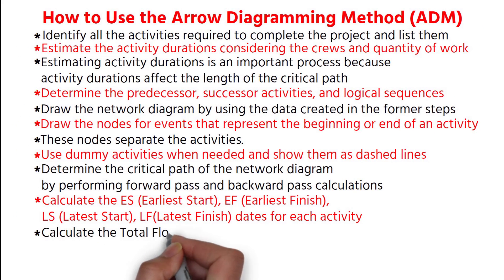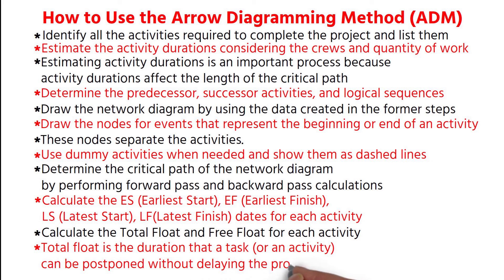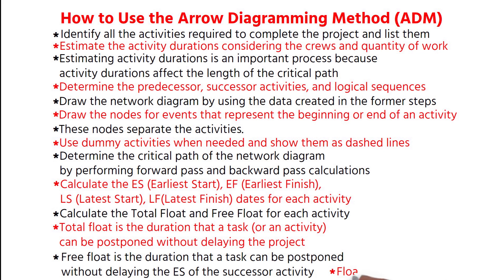Calculate the total float and free float for each activity. Total float is the duration that a task, or an activity, can be postponed without delaying the project. Free float is the duration that a task can be postponed without delaying the ES of the successor activity. Float is also known as Slack.